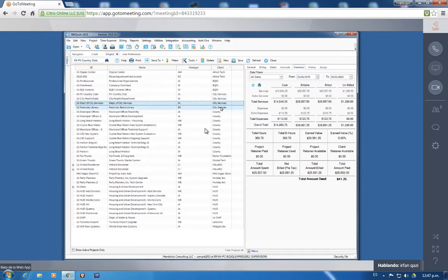So you want to look at the summary of the project rather than running 5 different reports and maintaining Excel spreadsheets based on employees putting in time and the billing that you do out of BillQuick. You can see the cost of your services, and billable value of those service expenses on a selected project, what's been billed, unbilled, total number of hours spent on the project, and based on spending, how much is my percent complete on the project?